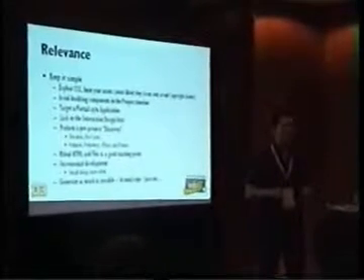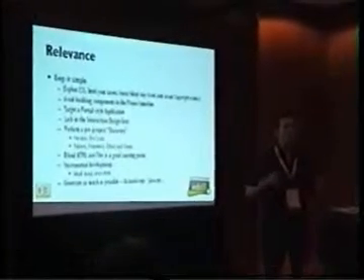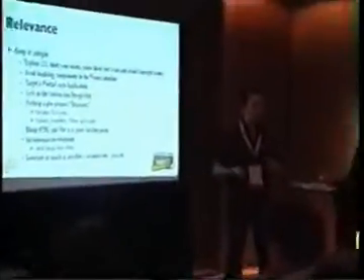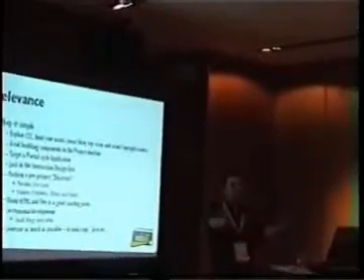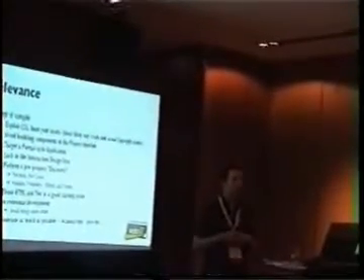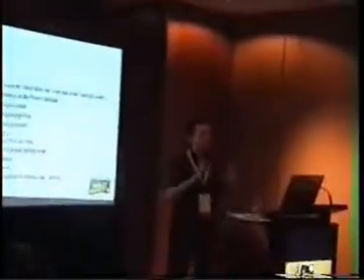Lock in the interaction design first. Really negotiate that, really design it up front first, and keep it simple the best you can. Perform a pre-project discovery process. Understand how big, how deep this application is going to be, because then you can sit back and limit it and phase it and say, well, for the first piece, we're only going to deliver this module, and we're going to deliver it this way with these personas, these use cases implemented. Understand the volume, frequency, the Flex trends.